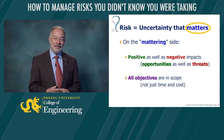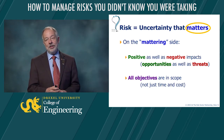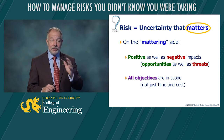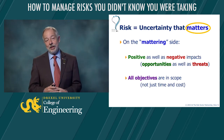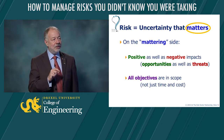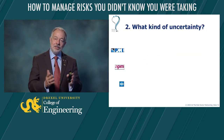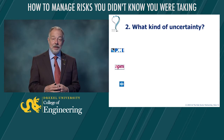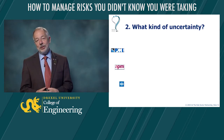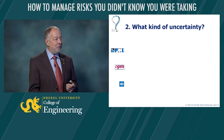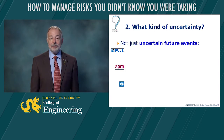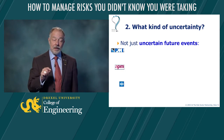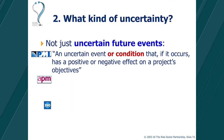So there are risks that affect our performance, reputation, technical compliance, and all of these other types of objectives. Any objective could be affected by risk, either positively or negatively. A mature, complete risk process should handle all of those types of risk. To summarise on the mattering side: it's not just time or cost. We need to think about positive as well as negative impacts, opportunities as well as threats, and we need to think about all objectives of the project, not just time and cost, not just the schedule and the budget.